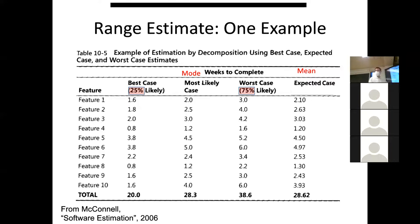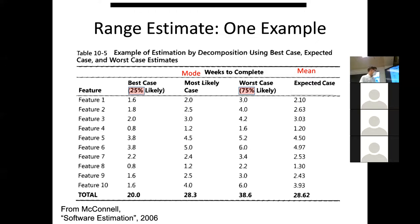Next time, we'll also talk about how it's not quite legitimate to simply total up the best cases — assuming you get the best case on feature one AND feature two AND feature three AND feature four AND feature five. That's kind of unlikely. It's like rolling dice and getting a six every single time — extremely unlikely. But it's also unlikely you get the worst case every time. So we have to deal with that. That's for next time.